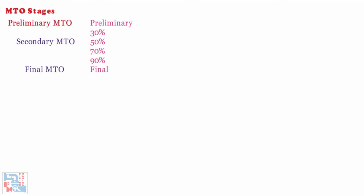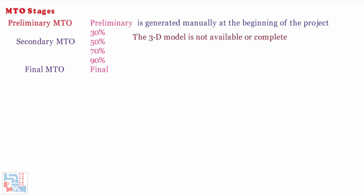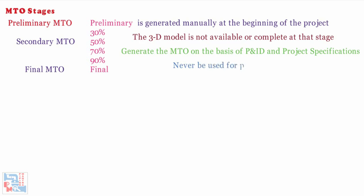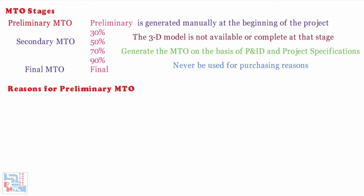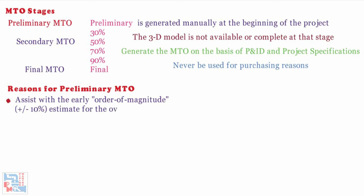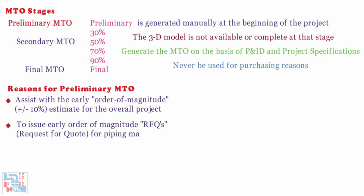The preliminary MTO is generated manually at the beginning of the project. There is usually limited information to work with, and very often the 3D model is not available or complete at that stage. Hence, we generate the MTO on the basis of P&ID and project specifications. This would never be used for purchasing. There are two reasons a preliminary piping MTO is usually done: first, to assist with the early order of magnitude (±10%) estimate for the overall project; second, to issue early order of magnitude RFQs (request for quotation) for piping materials.